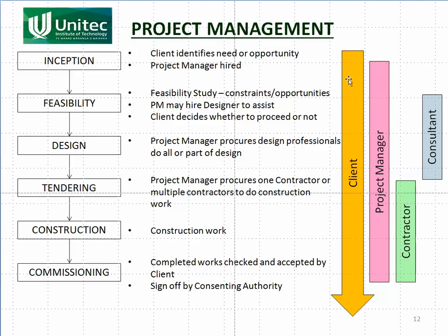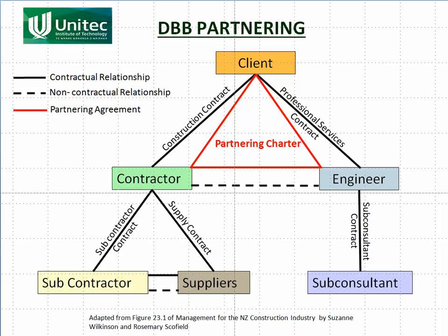And there's the process there. So inception, it's much the same as a DBB project, except that the design, the project manager's involved much earlier on, and he's all the way through, and he'll just pull in the design consultant as required, and the contractor as required as well. Now there's variation on the project management and the DBB models. It's sort of an add-on, if you like.